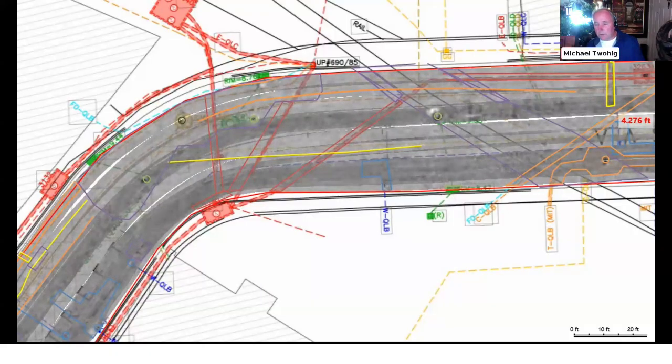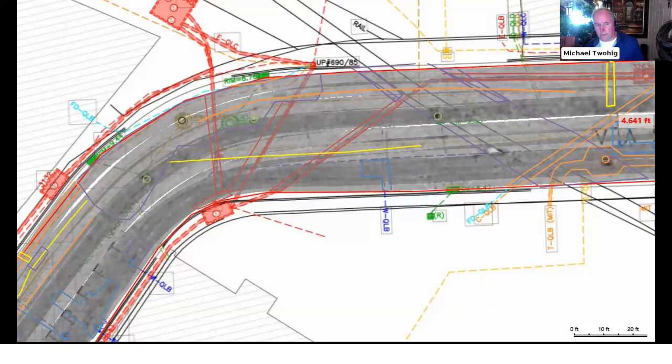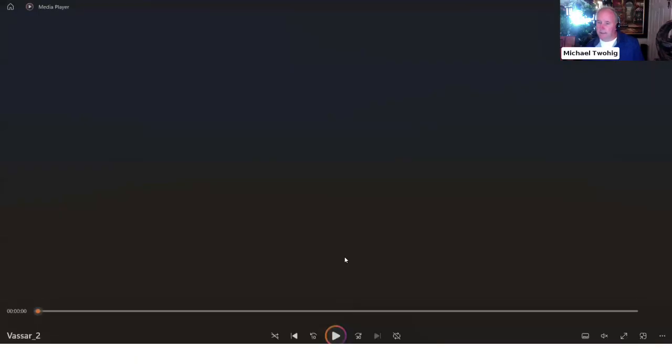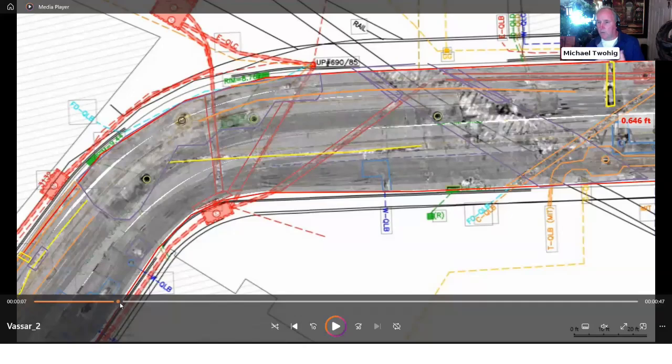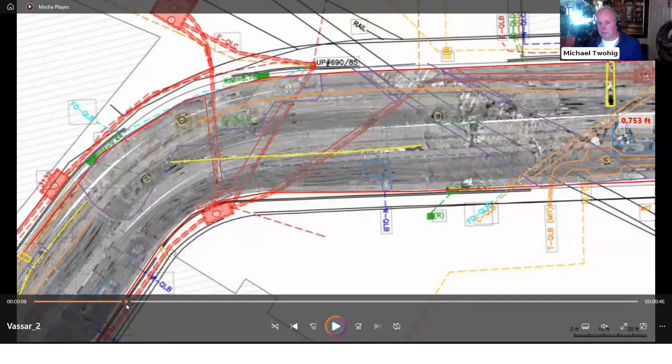So doing our homework, again, we were very familiar with Vassar Street. We got 40 years of history. This is over a mile street. It would have been at least $100,000 to do this type of street because it's so dense, it's so congested. There's so many utilities that are public and private that are in the private way. So just doing a design ticket for 811 is not representative.